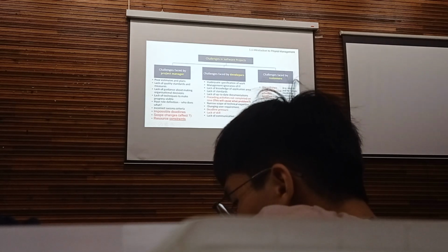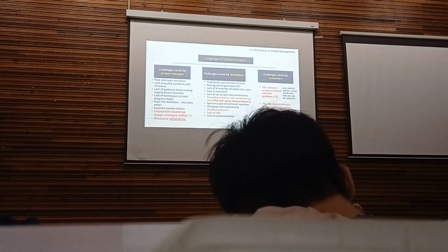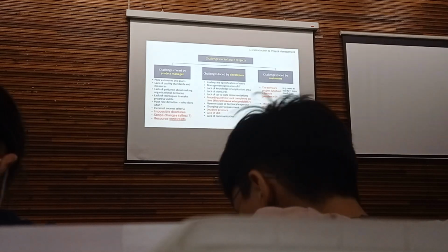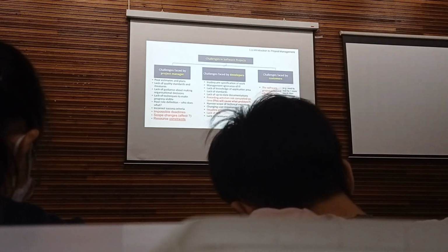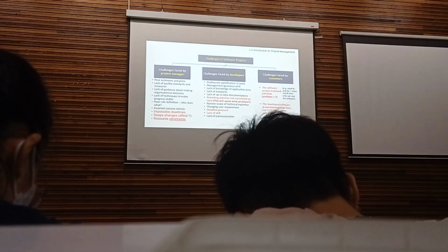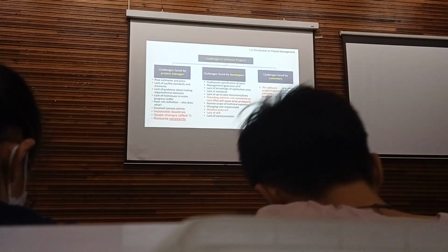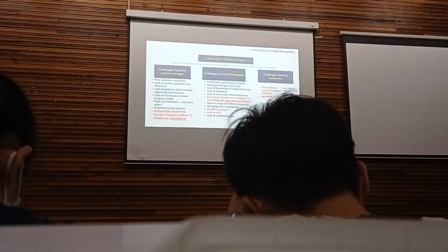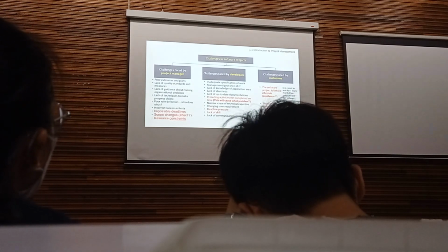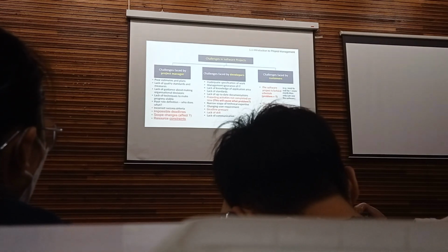Another problem is the developed software does not fulfill the present needs of the organization. The client receives the software, but the software is outdated and no longer meets the company's requirements. This usually happens for long duration projects, for example a 2 year project. You ask for the software in 2024, but you receive it in 2026, 2 years later.